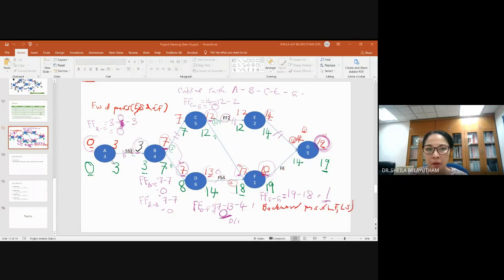For example, if activity A's duration is 3 days, but you complete it within 5 days, rather than completing within 3, you're completing in 5. That is not allowed, so it will affect the project duration. That is total float. For activities with total float, such as activity D, total float of 1 day, and activity F, total float of 1 day, it means that the activity could be delayed for 1 day before it affects the total duration.